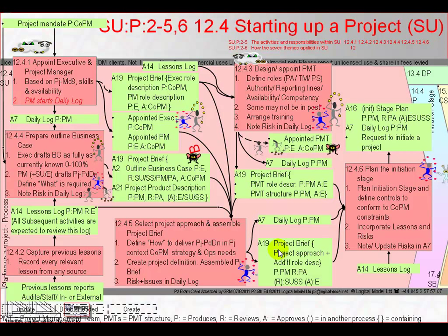Armed with as clear a view of objectives and the project management team as it has been possible to gather in the time and resources allotted so far, the initiation stage must be planned, scheduled, costed, and its control regime decided. This is the planning step, in accordance with PRINCE2's planning theme, to avoid being, quote, aimless and unstructured during initiation. If initiation looks large and complex, then the initiation stage's controls may adopt PRINCE2's controlling a stage and managing product delivery processes.